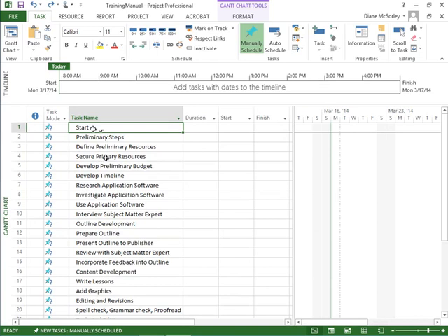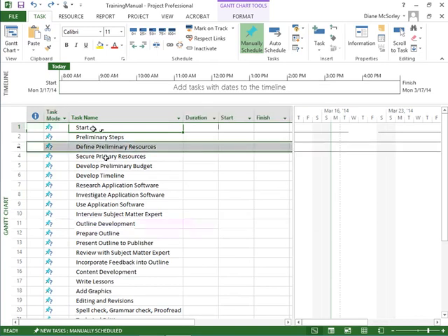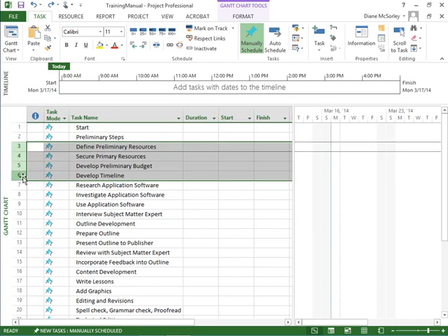So to make it easier to view, I select the tasks under a phase and indent them. To indent them, I'm heading up to the Task tab, into the Schedule group, and using the indent. Watch my task list. Not only are they indented, but my phase task becomes bold, gets a little twisty to the left of it.